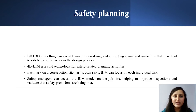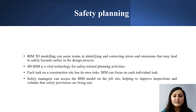Let us start with safety planning. How can BIM help in safety planning? So far, we have discussed that BIM-based safety planning is useful in identifying hazards and communicating safety plans to workers. 3D BIM modeling helps in identifying and correcting errors that may lead to hazards earlier in the pre-construction phase. But site conditions keep changing. Therefore, 3D modeling may not always be sufficient. In such cases, 4D BIM helps. 4D BIM means we integrate scheduled data into 3D models so that safety is planned and monitored as construction work progresses. 4D BIM is important for safety planning as it enables visualization of safety arrangements at different times and provides more illustrative safety plans.